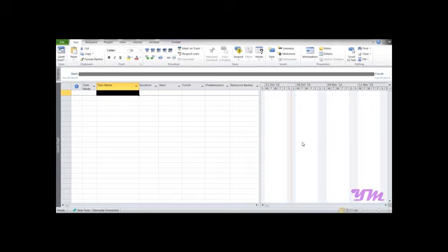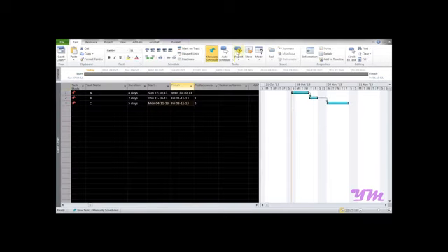To do this, we first need to prepare multiple project files, that is, combine project 1, project 2, project 3 into a single file. So to begin, we start by creating different project files. Say project 1 has activities or tasks A, B, C and so on, having durations say 4, 5, 2 and 5 respectively, and predecessors as 1 and 2. Make sure that you make it auto scheduled. Then we need to save the file.